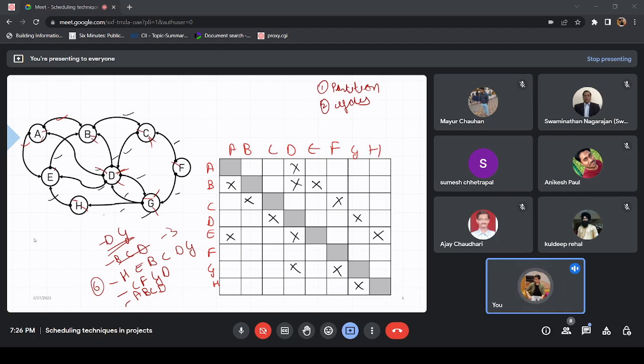Let's suppose you have to do this in a CPM or PDM manner, or you just want to follow what happens next, and you have to visit each of these activities only once. If you leave even a single loop in the network, you will find yourself going in circles over that.